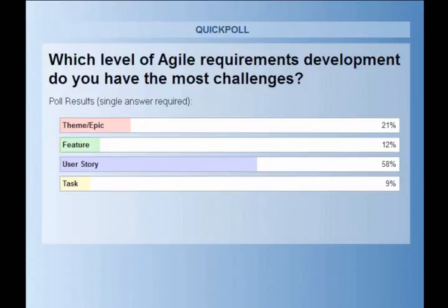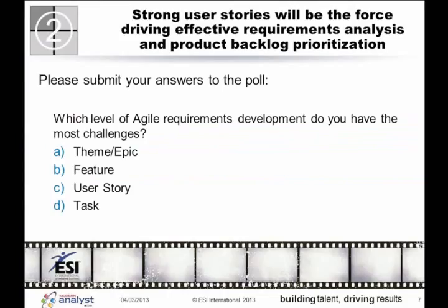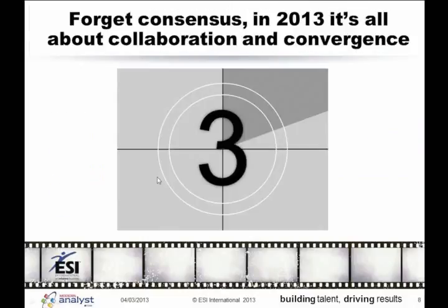It's funny that when you look at reports out there now, a lot of work we do with our expertise of elicitation and analysis of requirements, in a waterfall setting, because we need everything to be consensus driven and we wait and look for everybody to be okay with it, about 80% of the features and functionality that we deliver, that we've labored over gathering those requirements, are never used or rarely used. Only 20% are always used or sometimes used.